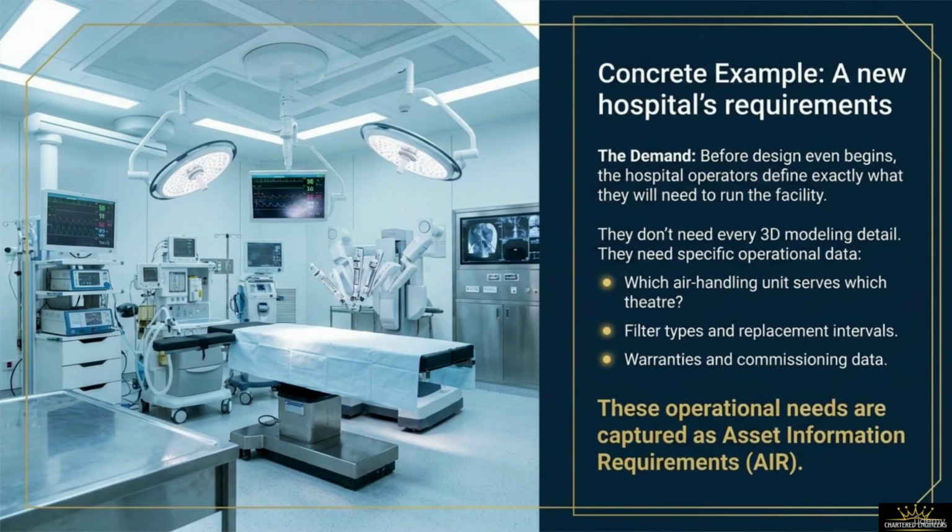Let's ground these concepts in a concrete example by looking at the development requirements for a modern hospital facility. Under a disciplined framework, the hospital operators define their exact demand before design or procurement even begins. They do not need every single line of 3D modeling geometry or cosmetic detail. Instead, they focus heavily on isolating specific operational data points required for day-to-day healthcare delivery. They ask critical mechanical questions. Which specific air handling unit serves which operating theater?